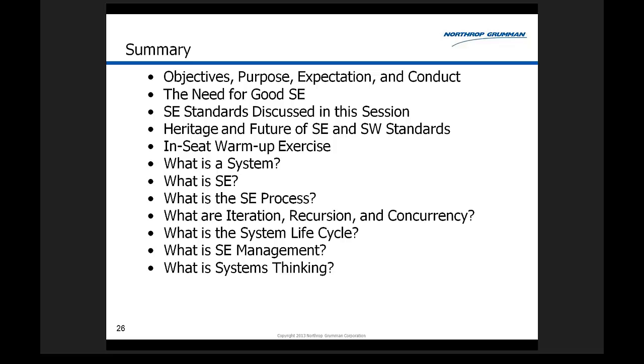Okay, but if the requirements are all firm and well known and will never change, then the older methods, waterfall or incremental, will work for you. But again, just make sure everybody is trained in it and understands it before they maybe start small in an Agile project and then proceed to grow bigger and bigger, because it is extensible even to systems of systems.